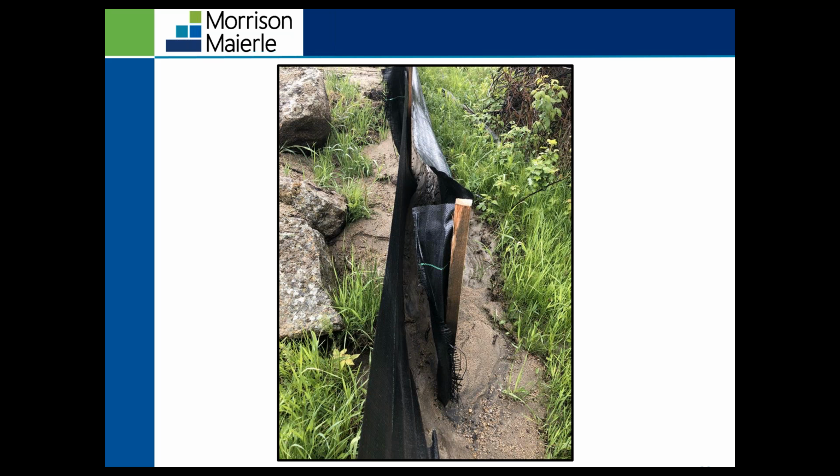So when you're a SWIP administrator, you have to identify if BMPs are no longer in effective operating condition. If they're not, then you have to determine corrective action that needs to take place so those BMPs are in effective operating condition. So this is an example of a corrective action, is making sure that you're wrapping those posts around each other and making sure you're removing the sediment that's discharged from the site.